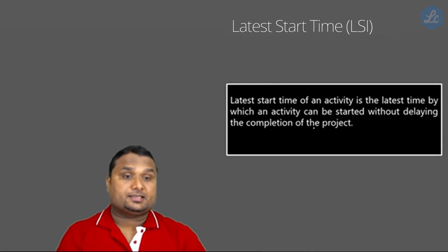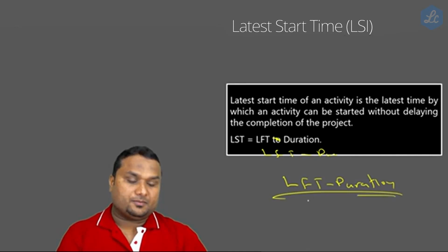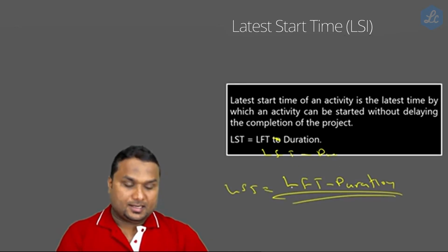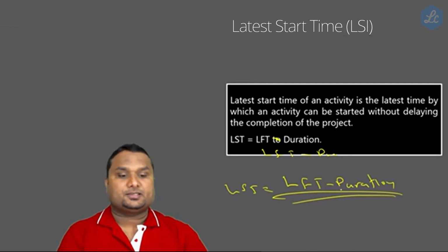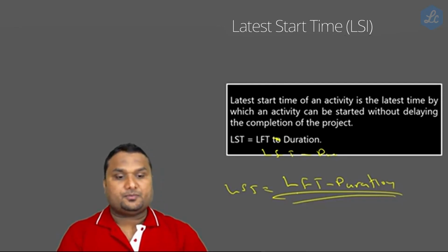Next, latest start time. Latest start time is latest finish time minus duration. LST, latest start time, means latest finish time minus duration.